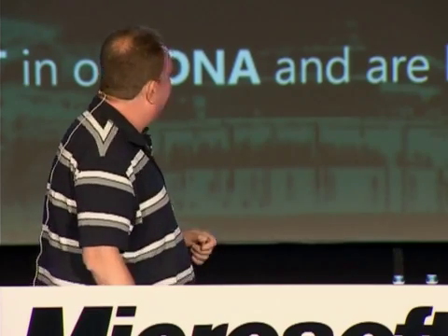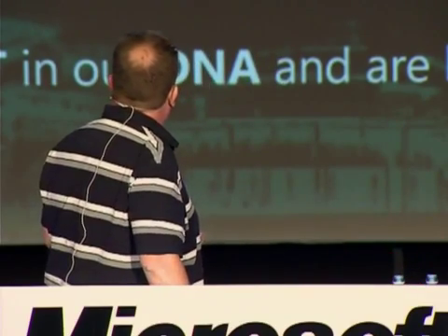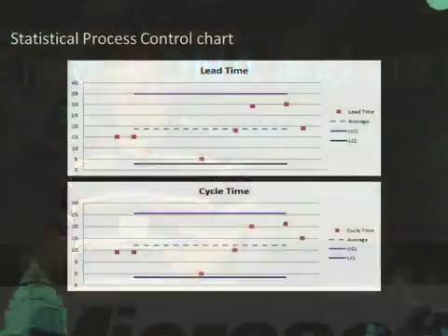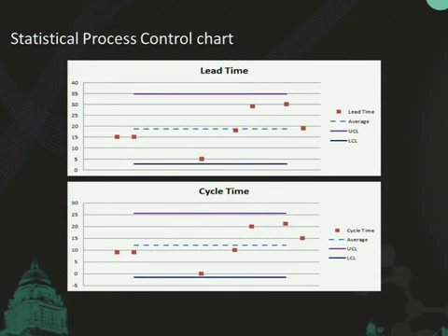So what we're saying is that the spread of predictability is quite large. Some take 30 days, some just took 5 lead time. It's interesting information because it tells us we're not very consistent, but are we measuring apples and oranges here? Some of the user stories were 14 or 13 story points, and some were 2 and 1.